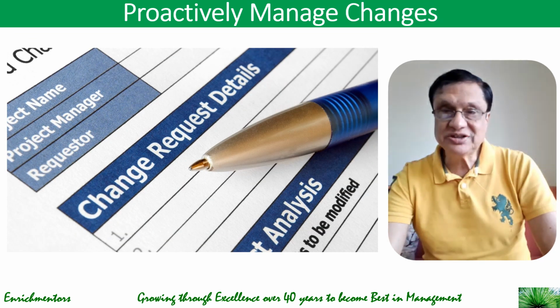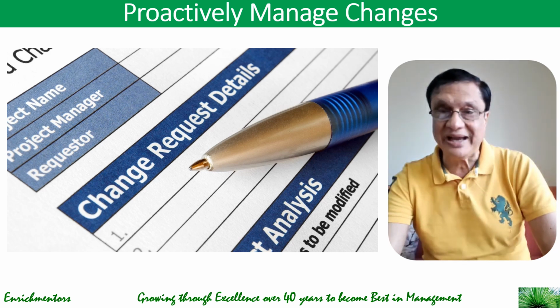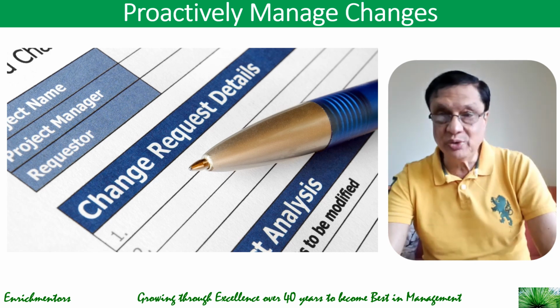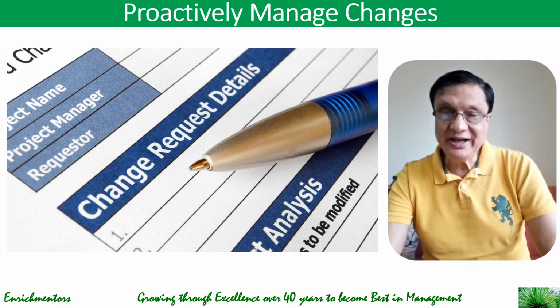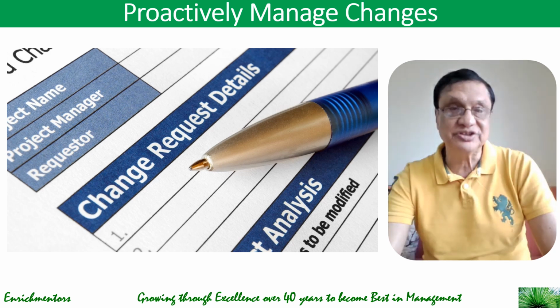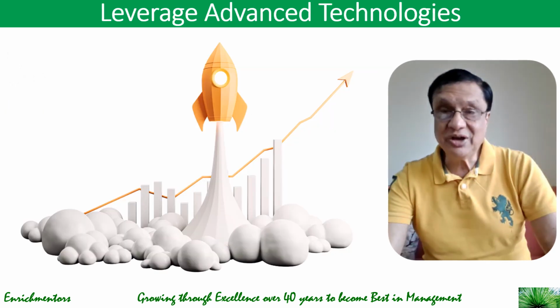Proactively manage changes by using a change control process. Use a formal system to evaluate and approve any scope changes. Avoid adding unnecessary tasks or features without timeline adjustments, and ensure stakeholders understand how changes affect the schedules. So, proactively manage changes.